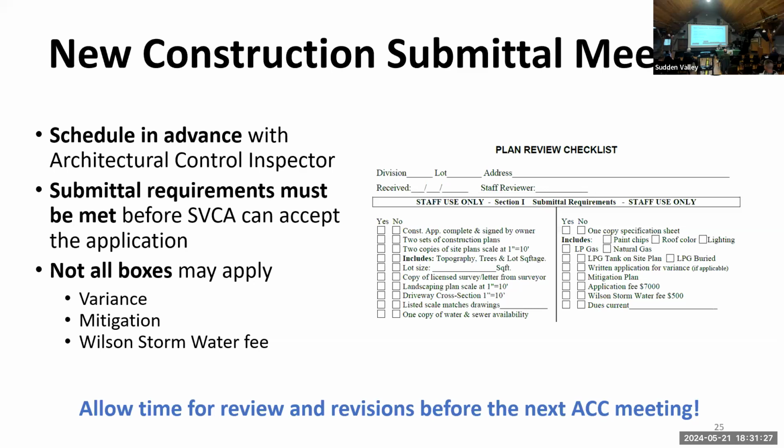All right. So there's always questions about the number of meetings you have to get through to get your new construction approved. There are at least 2 meetings that take place in the admin building. 2 of those meetings are with me or the architectural control inspector. One of those meetings is with the ACC.